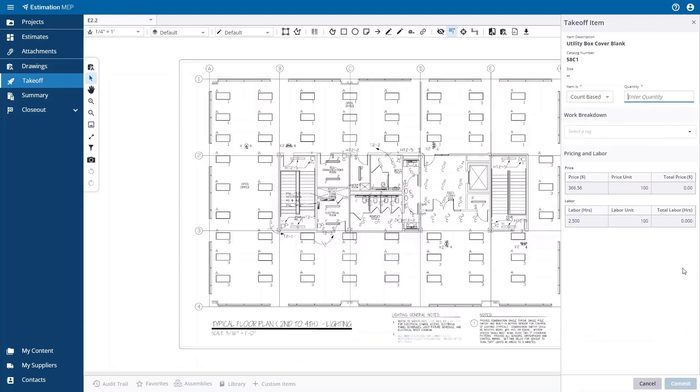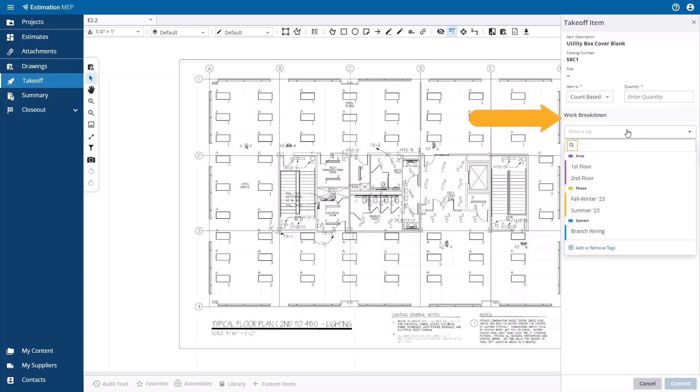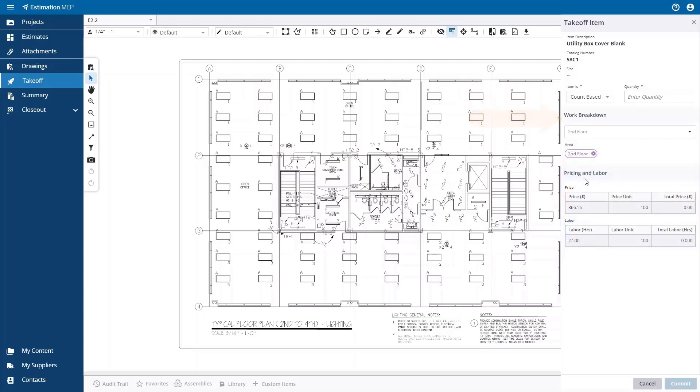The takeoff panel will open from the right-hand side. At this point, you can start drawing the annotation on the drawing, and you can also add a Work Breakdown structure label to the item. You can also add Custom Work Breakdown labels at this point also. As you draw the annotation, the total cost and total labor are incremented at the bottom of the takeoff panel.